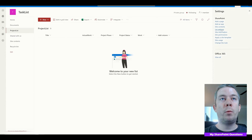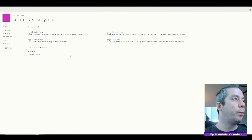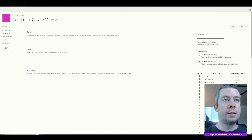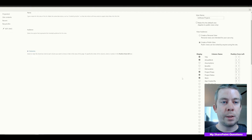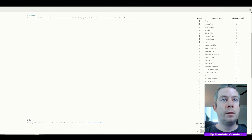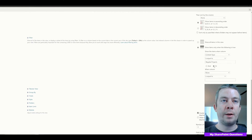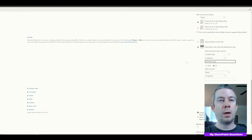We're going to create one more view — just like the Regular Projects view, except this is going to be Software Projects. We'll turn off Assumptions, Benefits, and Deliverables, and add the two different columns: UAT and Customer Support. Then down in the filter, we'll set it to when content type is equal to Software Projects.